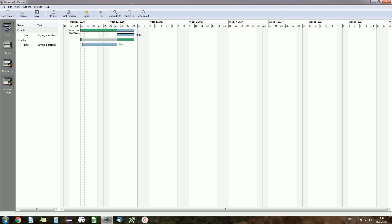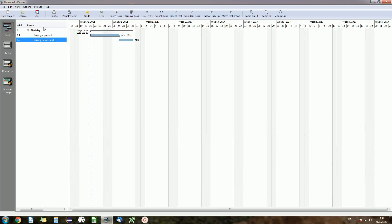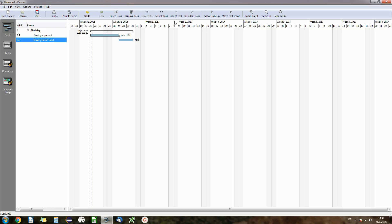If you're working alone as I do, if I'm planning my projects, you won't need the resources, at least I don't need them. So I always create my tasks and I order the tasks, set the workload or the duration of the tasks, so I know what my project length will be.